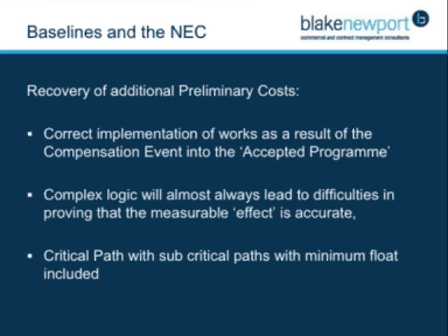Okay, recovery of additional prelim costs, and this also runs in tandem with the deferment of liquidated damages. It's essential that the programme contains sufficient level of detail to be able to accurately insert the change activities. If you've got a very high-level programme with not too many activities and durations of 6 and 8 weeks, it becomes very difficult to accurately predict where the effects of the change are. So the greater level of detail is much more responsive to the effects of change.